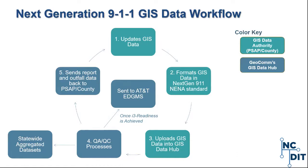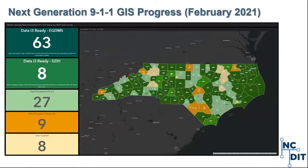This is a status update map of the Next Generation 911 GIS project progress throughout the state, screen-grabbed on February 11th. We now have a total of 74 counties or PSAPs that are I3-ready. The dark green designations mean the data has reached I3 readiness — the initial stage is to reach that in the GIS Data Hub, and once complete it eventually transfers over to the EDGMS. Sometimes things sit within the GDH for a little bit due to scheduling.